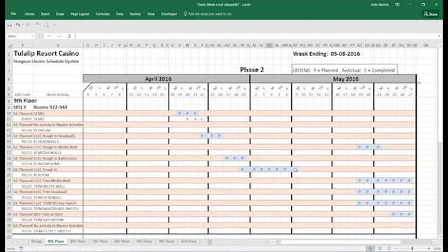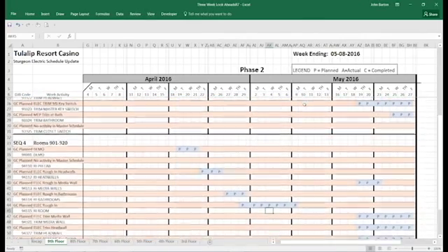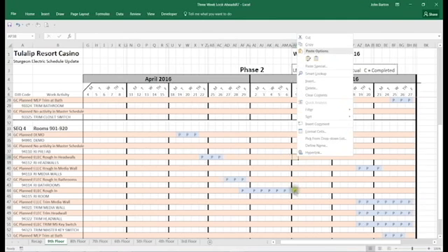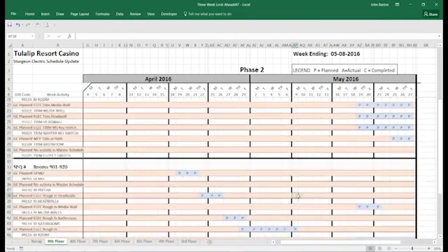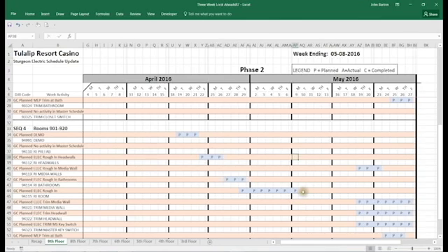And that way, everybody can sit down, kind of get a game plan, because we can see that we're on this week now, but next week, what is it we're supposed to be doing? Well, guess what? There's not a lot of work here. It's saying that according to the general contractor, you've got a Monday to do some work, but that's about it. So you got to start figuring out, can I do some prefab on Tuesday, Wednesday, Thursday, and Friday that's going to help me on the next floor down or whatever. You need to kind of figure that part out so you can level your manpower as time goes on.